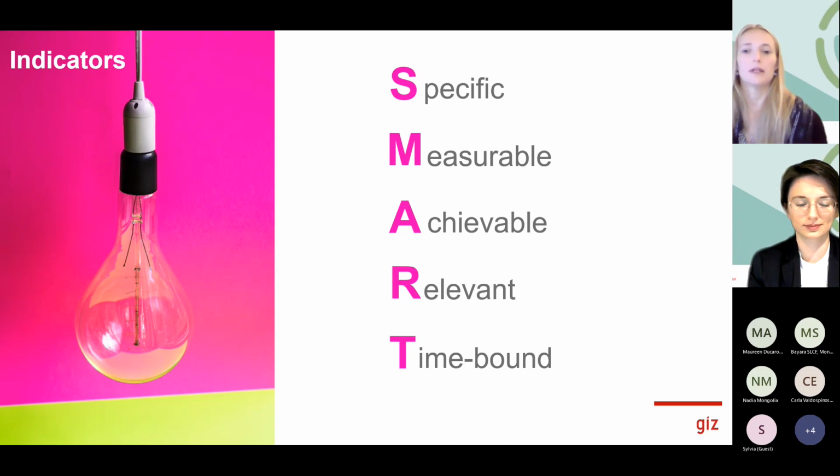And it's also really important to keep in mind that the effort of data collection is super critical, because it has to be reasonable in relation to the relevance of your indicator. If it's a small component of your project, please keep in mind what effort you would need to get the data to measure this small component. That is why, for example, it's normally way harder to measure the increase in food production of a farmer compared to the number of trainings you conduct with farmers.